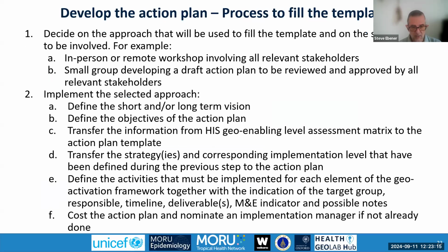The process to fill the template, there are different approaches that can be used depending on the country context. And we have already been using some of these methods. This can be done either in person or through a remotely organized workshop involving all the relevant stakeholders. That's the ideal approach, I would say, if you can have everybody in a room during one day or two, go through first validation of the result of the assessment, identification even of the strategies, and then use all of these for developing the action plan. That's the most efficient way, especially if you can do that in person.